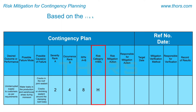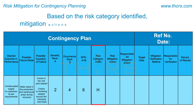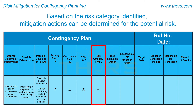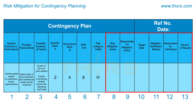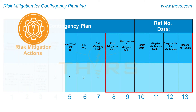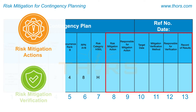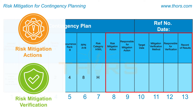Based on the risk category identified, mitigation actions can be determined for the potential risk. The columns from 8 to 13 in the Contingency Plan template are used to record the risk mitigation actions and their verification.